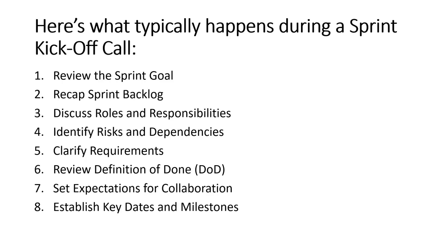So what does it mean? Basically, when the development team is done with the solutioning part, if they have written any code, the code should be reviewed by another team member, and it should be unit tested, and 75% of the code should be covered in the unit testing.